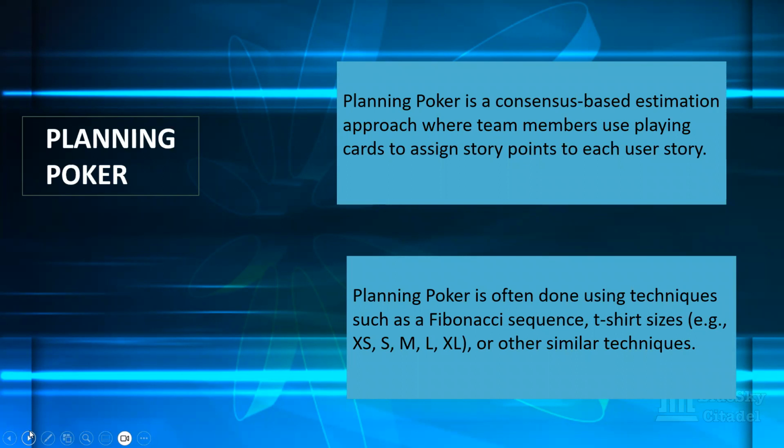I have a situation where at times, some teams do it differently. Some just discuss it verbally. They say, oh, okay, I'm coming down or up to your level, because now I understand. So they change their estimate. Planning poker allows you to change your estimate if it has been set up like that. Then the team has a consensus, and they unanimously agree on a number going forward. However, I know Laomi has explained to you also that in situations where people do not reach the same consensus, don't be alarmed about it.